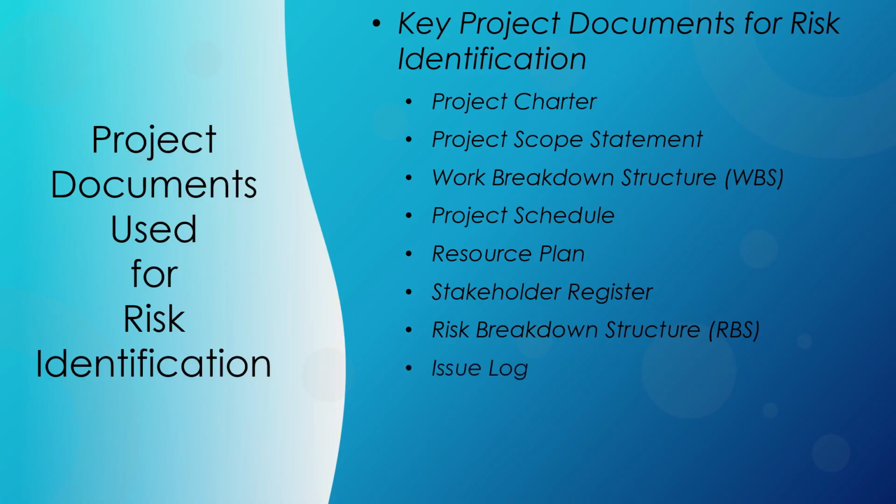The issue log tracks current and past issues encountered during the project. It provides a record of issues and their resolution status. By reviewing the issue log, project managers can identify recurring problems and potential risks that might arise from unresolved issues.